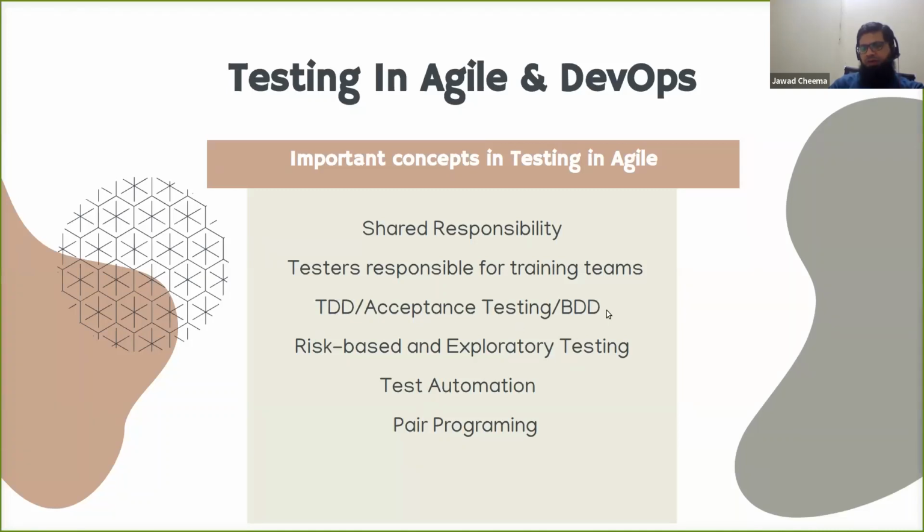And we need to apply techniques like test driven development and behavior driven development, so that quality test scenarios are written before writing the code, right? Basically, like I said, the focus of testing should be on the user story and not the whole application or the features, or all the major releases. So you need to identify what impact each user story can have, identify the risk associated with each story, and then do your testing according to the associated risk rather than trying to test the whole application. And then of course test automation is critical, because without this you cannot trust, and therefore you will have a lot of manual intervention which will slow down your DevOps adoption, right?